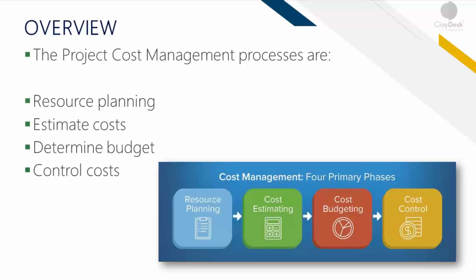This is by far the most challenging aspect, because costs can very easily go out of control. In my experience, when you work on projects, sometimes you don't have control over the costs — there are certain instances where there's nothing you can do. For example, one of the lead developers just quit, and now you have to hire an external resource immediately rather than going through the full HR hiring process, which could take weeks or months. So costs go up — that's a real-world example.